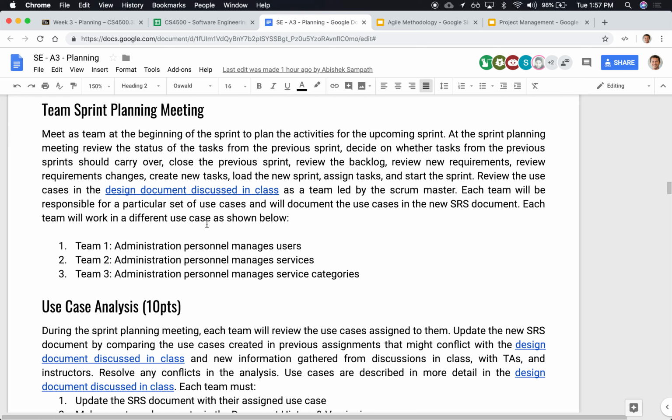Everybody will have to report what they have achieved so far, right? If they are blocked, okay, and what it is they're planning to do next, right? Those three things, okay. A Scrum meeting won't try to solve any particular issues. So it should not become something long, saying, well, no, but my connection didn't work, and then I wasn't able to deploy, and there was some bug. No details, right? The Scrum meeting should be status information, only status.